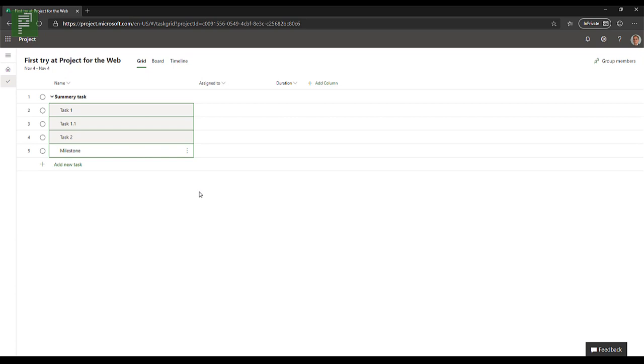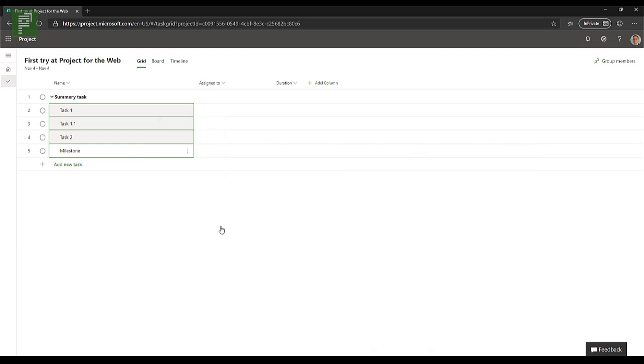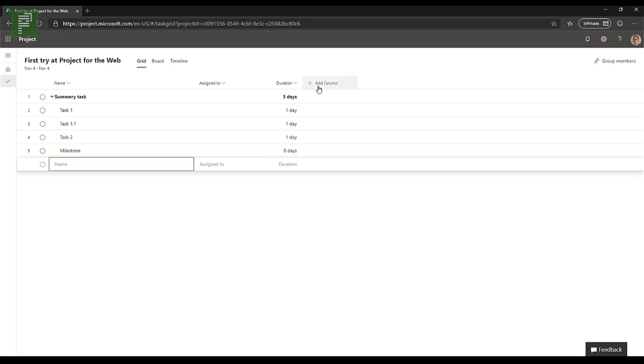So we have a very clean board view, or very clean browser view. All the buttons that you know and love from undo, redo, and all that, it's still in here. It's just not visible. So let's make them all dependent on each other. So add dependency, and I will see that, oh wow, it took notice, and everything has a duration now, which doesn't make sense for the milestone. So let's click on 0 here. It is 0 days.